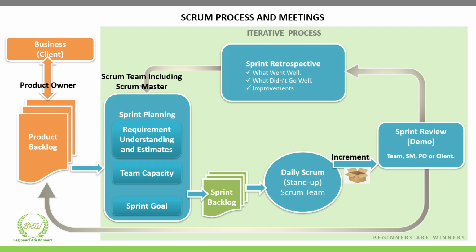Once the team understands the requirements, they need to estimate it, and it must be done before every sprint, either in hours, for example, how many hours or days it will take to complete the delivery of a feature, like login functionality, that how much time it might take to complete the login feature. Or the team can also do story pointing for estimates, which means it's a measuring unit instead of hours to estimate task duration. For example, it's done in a t-shirt sizing manner.